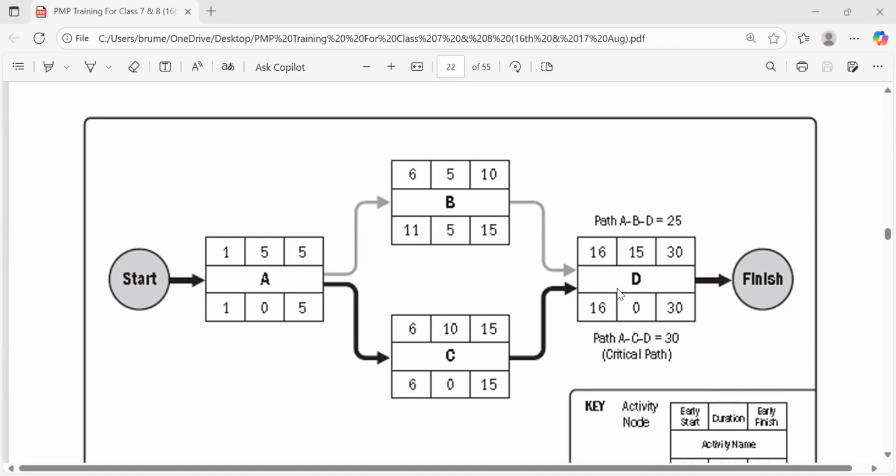So when an activity that is meant to run sequentially is made to run concurrently, it becomes fast tracking. That is another way of schedule compression. And you have just saved time and money now. Do you like that technique?